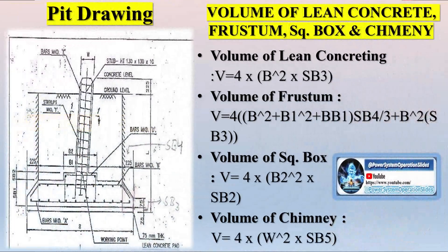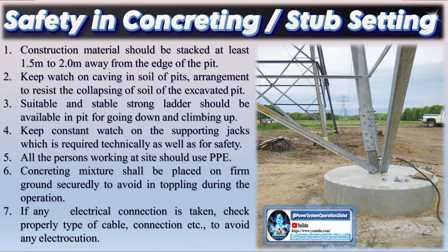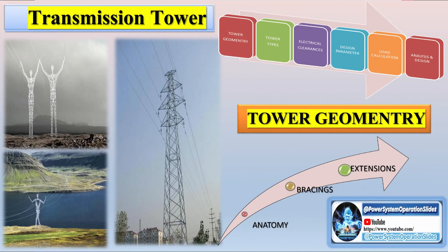Once the soil investigation is complete and the foundation designs have been finalized, the project can move forward to finalizing the tower schedule. The tower schedule is finalized in two phases: the partial tower schedule and the full tower schedule. The partial tower schedule is typically finalized first, after the detailed survey and soil investigation have been completed for specific sections of the route. This allows construction to begin in those sections while the remaining portions are still undergoing surveys and investigations. The partial schedule includes the precise location, height, and type of tower for each segment, as well as the required foundation design, helping streamline the overall project timeline.